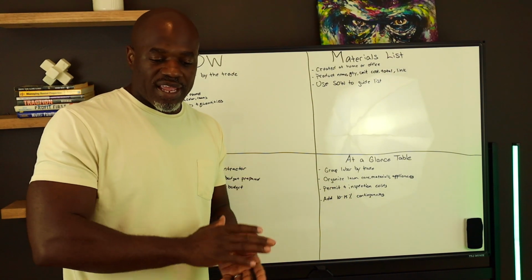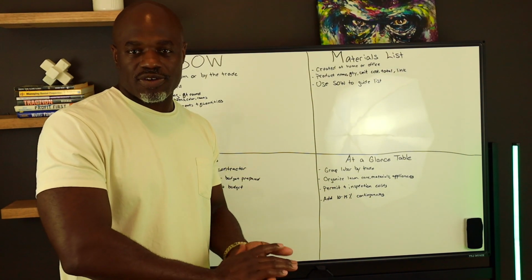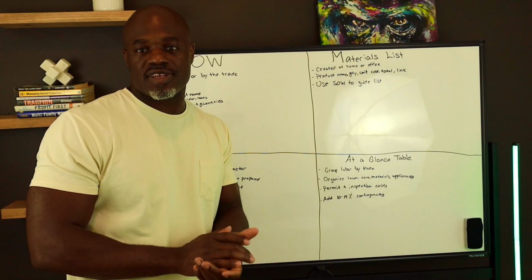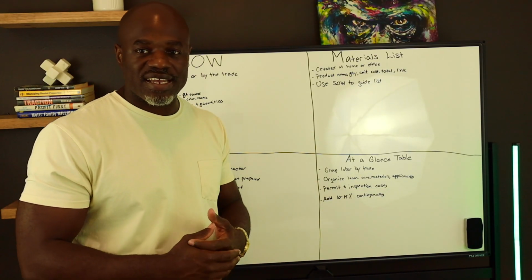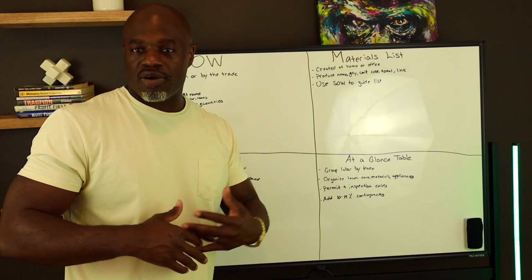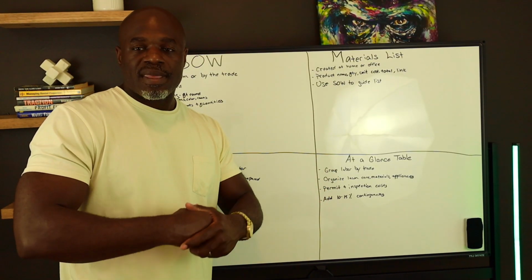Or else, do we already have hardwoods? Hey, we're just going to refinish the hardwoods and we'll run porcelain in the kitchen and the bathrooms. Our kitchen maybe 10 by 10, our bathroom 5 by 5. How much square footage is that? So now we know how much porcelain we need to get.